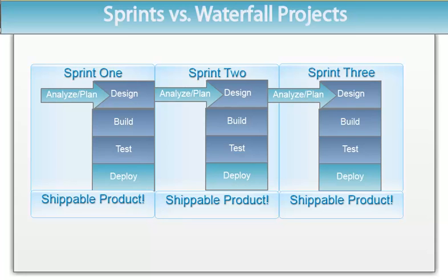In Agile, you deliver something on the delivery date every time. If there are incomplete, unusable items at the end of the sprint, the deadline is not moved out, but instead the incomplete items are de-scoped and moved to the backlog. Once a user story is de-scoped, it may or may not be assigned to future sprints, but at least the customer gets the product on the date promised with some usable features.